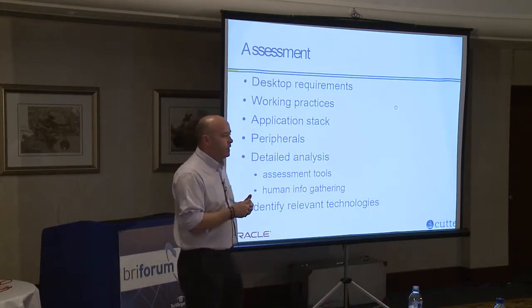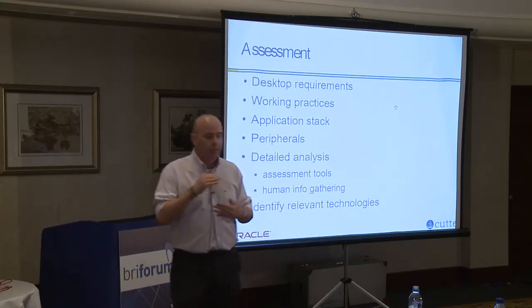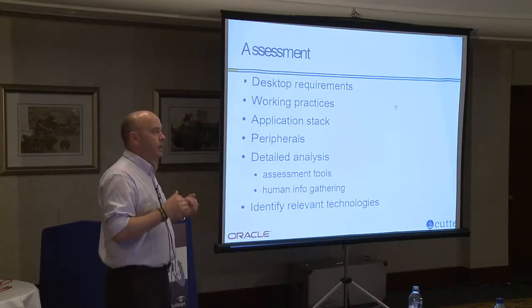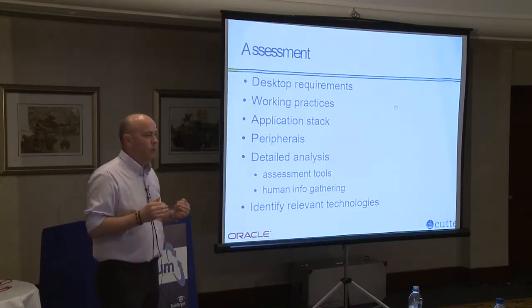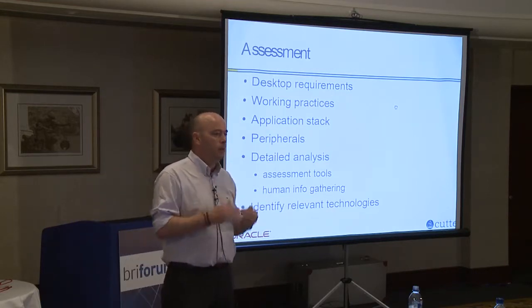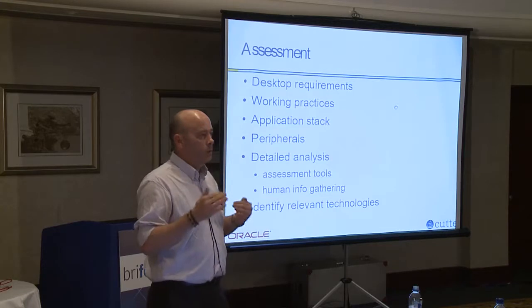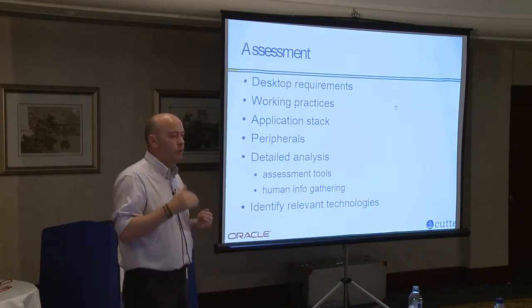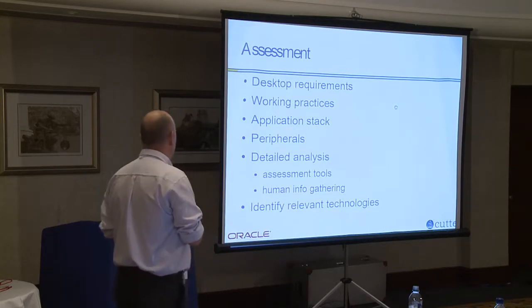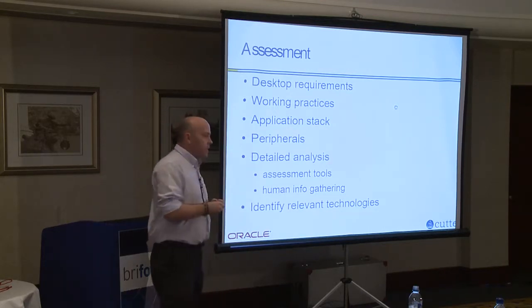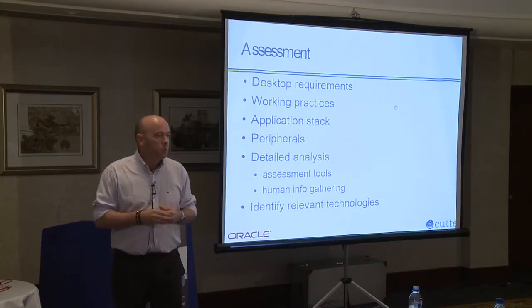Key to where VDI fits is understanding that user's working practice, but more importantly, on top of that is their application stack. There are certain applications, as we all know, that will not fit well in a VDI environment. If you manage that expectation at the beginning and let them know it's not going to work, then you're not going to run into the problem. It's if you're trying to shoehorn the technology to fit stuff where it's not going to fit, that you'll run into problems. Peripheral devices, under any of the VDI technologies, can cause problems.